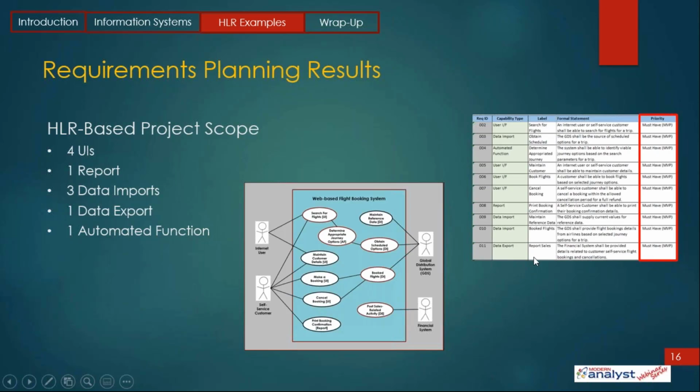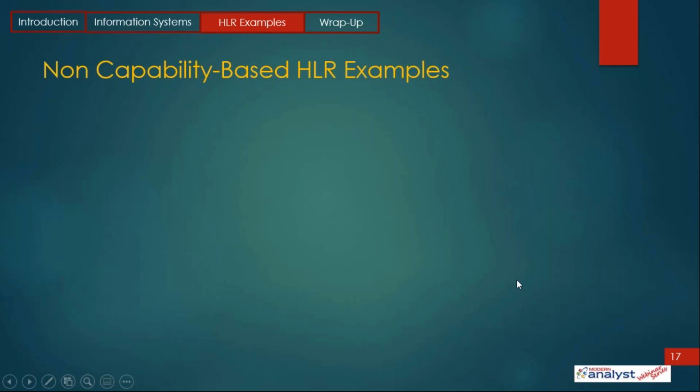We have high-level requirements. As long as their priority is high enough to keep them in scope, we need to deliver these. If we miss something and we need to add an 11th thing, okay, well, that's a change of scope. We missed that. We put that in scope. We find something we don't need as much as we thought. We can do it manually, take it out of scope. What we have done is we're in this project, a waterfall project or a hybrid project, managing our requirements, high-level projects. Okay, so I've shown you what I consider to be good examples of high-level projects.